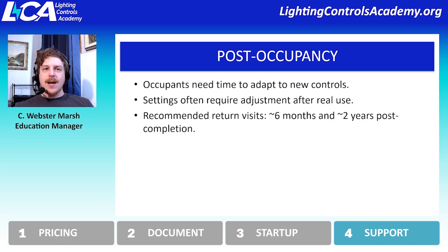So it's recommended that two return visits are scheduled. The very first one, maybe about 6 months in, just for the fussy minor tuning or any issues that have come up but never been mentioned to anybody. Having a walkthrough with somebody who knows the system enough that they can give you feedback about it is going to help make sure that they're satisfied with the system.